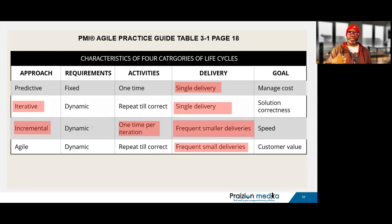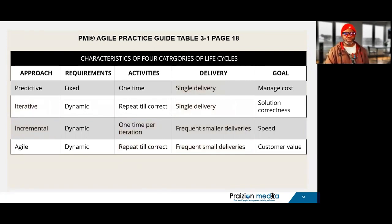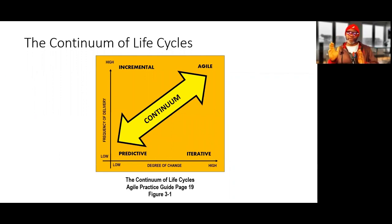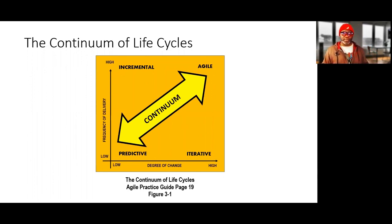It's easy to get confused with incremental and Agile, but there's a major difference. Incremental is one time per iteration; Agile is repeat until correct. Incremental is best used when the degree of change is low. Predictive has a similarity with incremental in that change is low, and a similarity with iterative in that it has a low frequency of delivery. This is a major thing to get from chapter two.